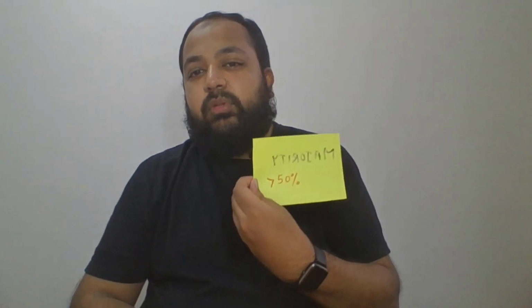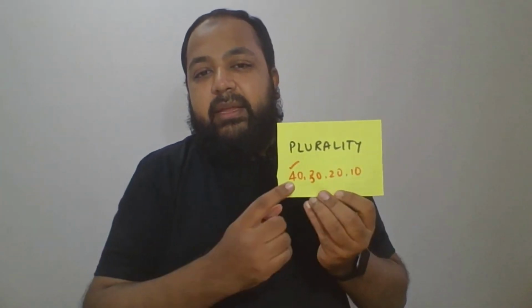So in that voting technique, more than 50%, you will have to do the majority. Then plurality: you don't have a majority, but the highest group, say 40%. If they are agreeing, then you go ahead and do it.